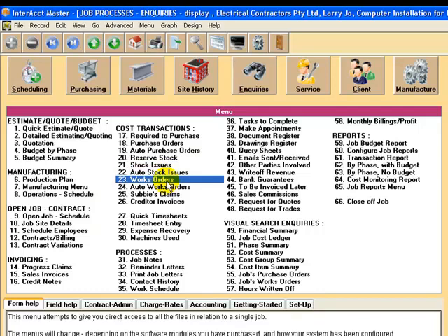Works orders is where you're raising works orders on subcontractors to perform certain trades. And again, if those works orders are part of your budget, you can automatically raise purchase orders based on the budget and the nominated subcontractor that you want to use. Also part of transactions, of course, is those subcontractors submitting claims against the original purchase order, and of course you can have things like retentions in there. You can have variations to contract agreed with the subcontractor and all those sorts of things.